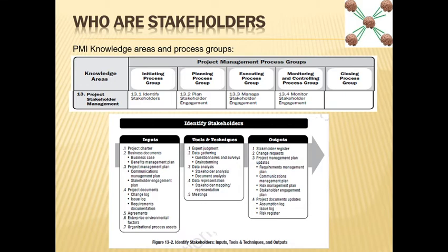It can be a simple Excel sheet with 3-4 columns and a list of stakeholders, where you put, okay, this is stakeholder number one, how much influence he has on the project, what his position is, whether he is an approver, or should be only informed, or a kind of both, or whatever.